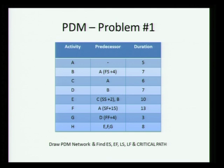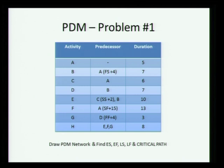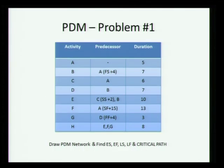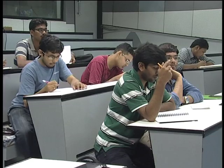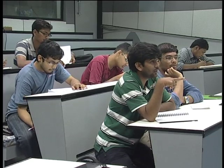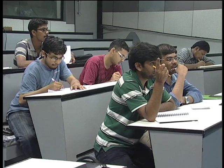A student asks: in the F-A relationship, is there a start-to-finish? Yes, start-to-finish means A start to F finish. F can finish 15 days after A starts — there is a 15-day lag. So in the A-F relationship, F finishes first; A will finish after F finishes. There is no direct finish relationship — F can finish only 15 days after A starts.